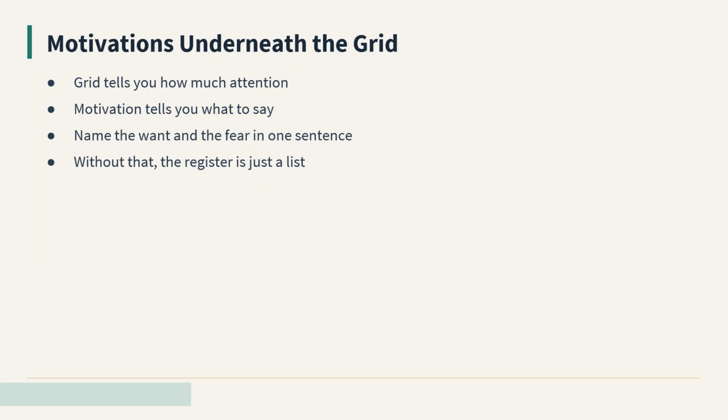A sponsor's motivation may be a promotion tied to a strategic initiative. A department head's motivation may be protecting their team's relevance. An end user group's motivation may be a workflow that is finally bearable. If you can name the motivation and the fear for each high attention stakeholder in one sentence, you have done real analysis. If you cannot, the register is just a list.